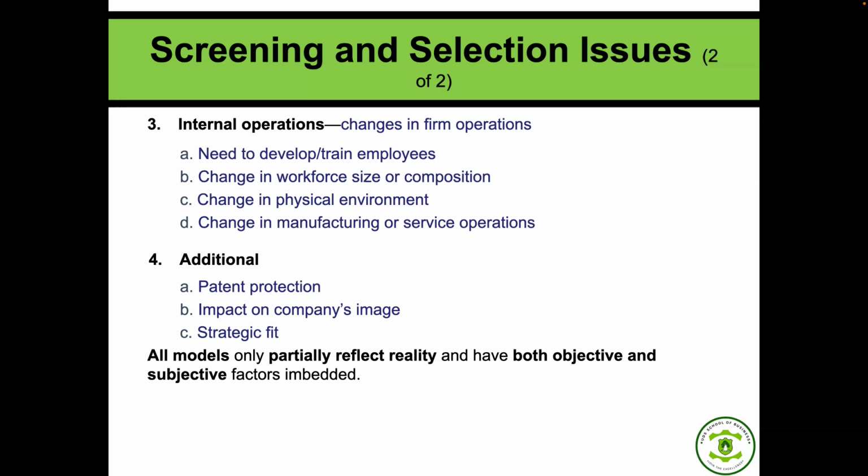Yes, also the issue of change in workforce size or composition. We have to consider the fact that sometimes an organization may have a workforce of, say, 10, and they embark on a project, and some critical staff may have to be put on the project. The composition in terms of the staff who were already on existing projects will change. If we don't have that technical expertise or capacity to be able to simultaneously handle what we were already handling and what is coming on board, there's likely to be a critical or dire need for staff.